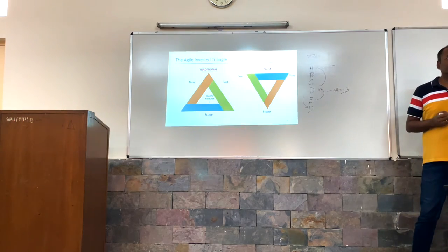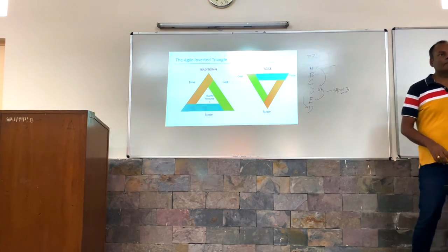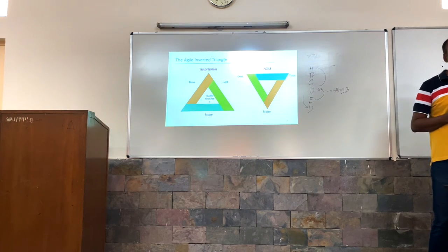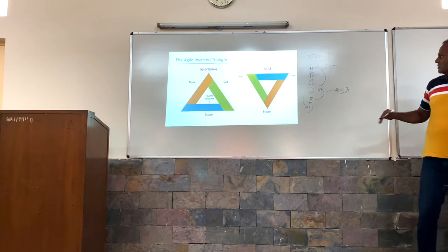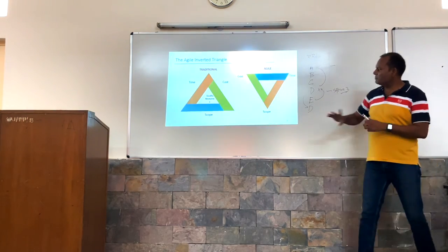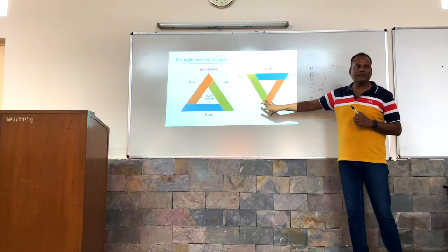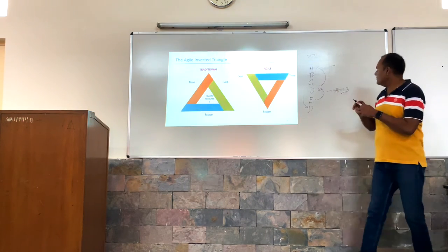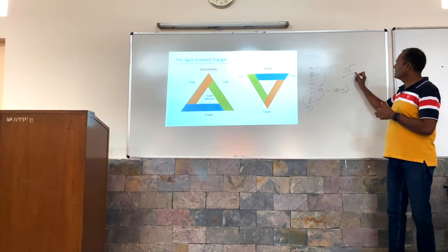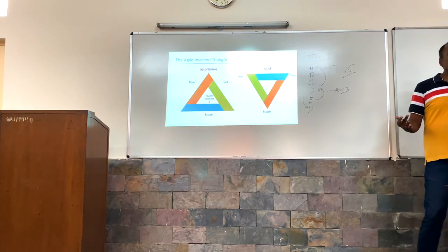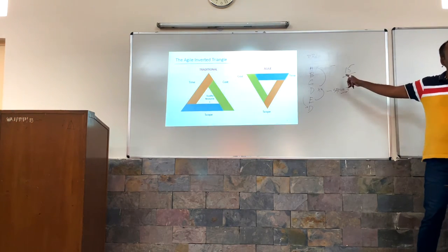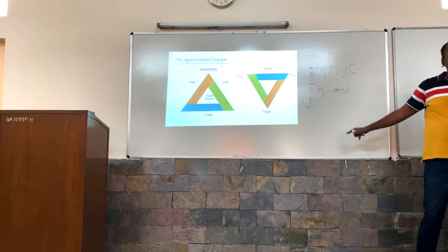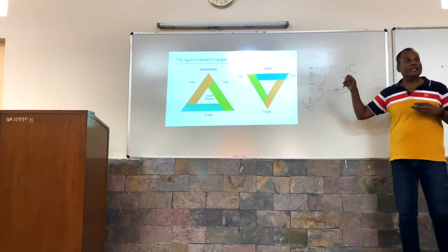Overall project cost and time must be the sum total of all the sprints. My scope can vary, but my cost and time cannot vary. I have only 15 days of time. You tell me what is important, I will work on that. But if the customer says, no, I want both these things, then I ask, what is your priority?